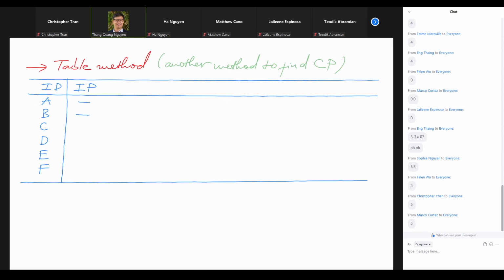All right, so A is a free activity. There's no requirement before A. There's no requirement before B, right? And C is sending out the invitation card, so we need to know the date and the location, right? So A and B come before C. And then D requires a date. So we have A, right?